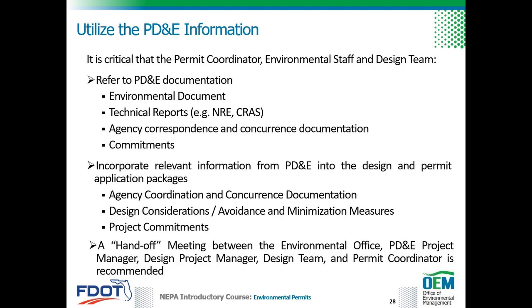It is critical that the permit coordinator, environmental staff, and the design team refer to the information prepared during the PD&E study, such as the environmental document, technical reports, such as an NRE or Cultural Resources Assessment Survey report, agency correspondence, and commitments to incorporate agency input, design considerations, and project commitments into the project design and related permit application packages. A handoff meeting between the environmental office, the PD&E project manager, the design project manager, the design team, and the permit coordinator is recommended to ensure this information is discussed and key issues are addressed.